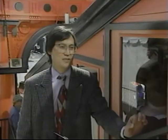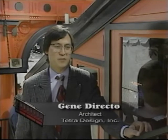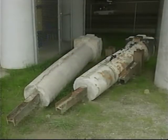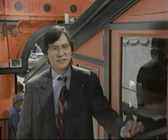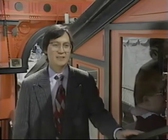The archway, however, presented additional problems. We were originally planning on using the arch columns, as much of the historic fabric of the arch as possible. But in the process of trying to reconstruct it, it was discovered that the steel columns within the columns had rusted, so it was starting to deteriorate from the inside out.